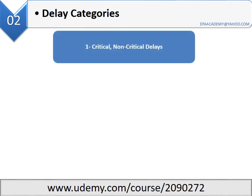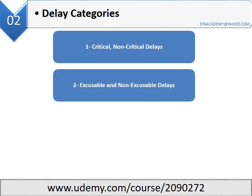Second station: delay categories. One — critical and non-critical delays. The project activities comprising a schedule are two types: critical and non-critical. The non-critical activities have a certain number of days of float, where the activity can be delayed without delaying the whole project.